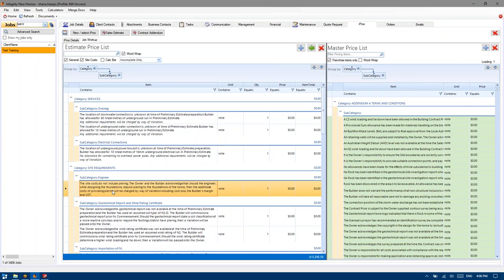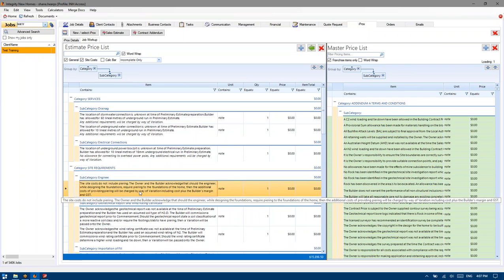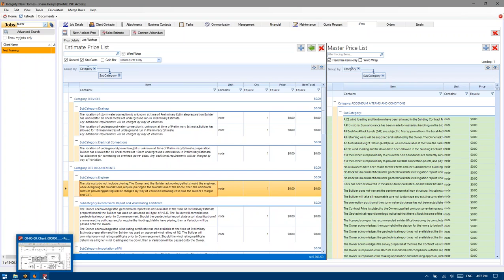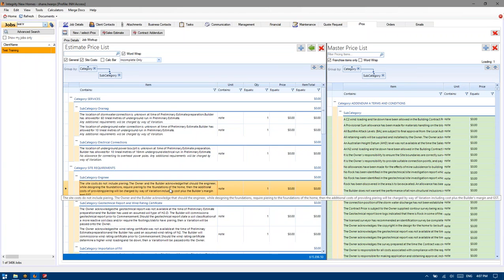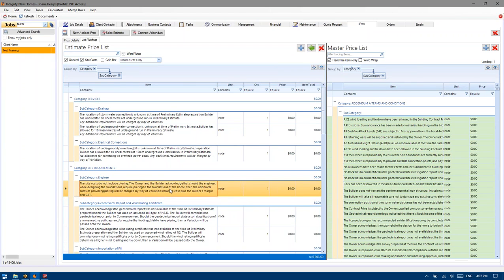That's a very important note to manage clients' expectations — because when they do decide to invest in you and go to the next stage, and they pay you a bit of cash to organise contour and geotech, and the contour comes back and the site conditions are all fine, it's an M class, everything's good to go, but then the contours come back and you realise you've got to cut into a bank and move some dirt around and build a fill platform, you can explain to the client where that cost has come about and why peering has been required. Just going to mark that as complete.